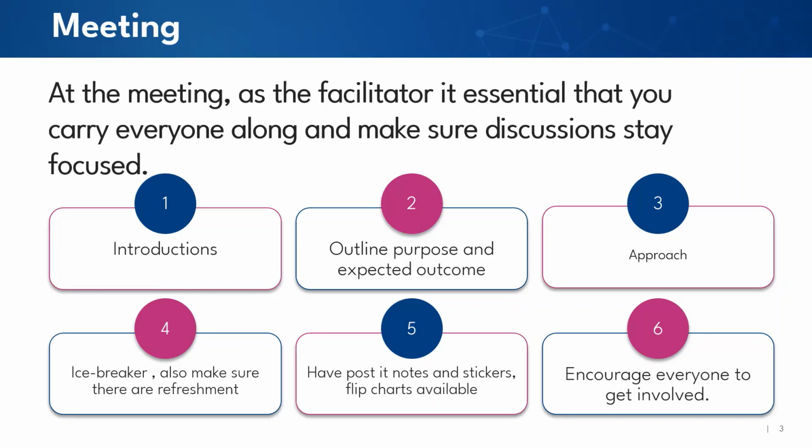I've sectioned it into the areas that I want us to concentrate on, right? So can you please all have a quick think? You give them a chance, without making any assumptions, to write down the lessons that they think they have learned in those categories. Sometimes you just put the paper all across and you don't even choose the categories just yet.